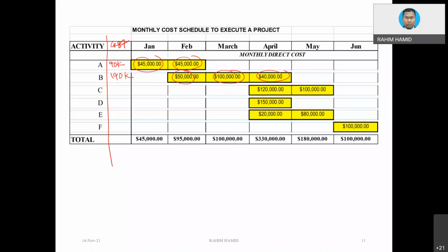Okay, but sometimes the funny thing about certain activity like mechanical and electrical, for instance. Sometimes the amount of the material itself is very expensive. The installation could be very fast.